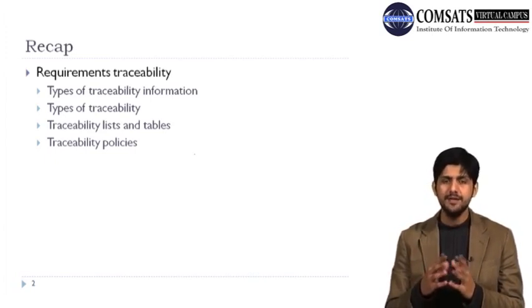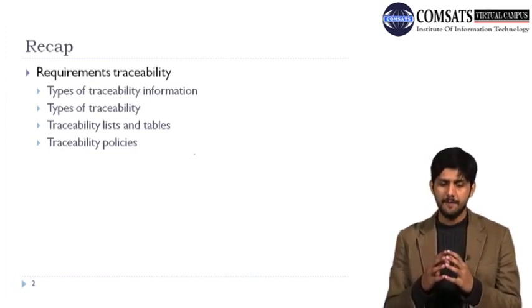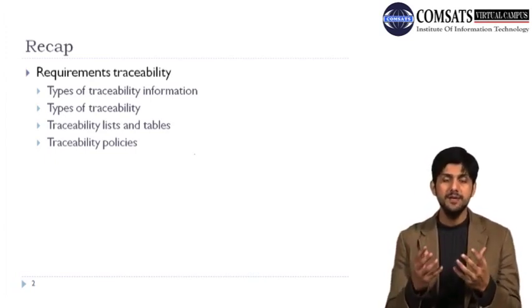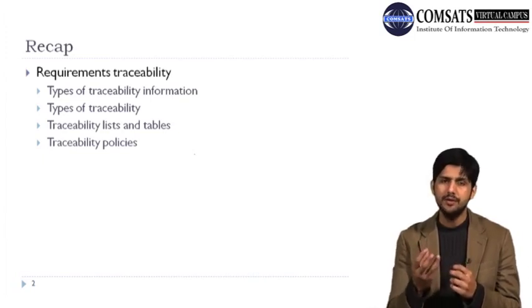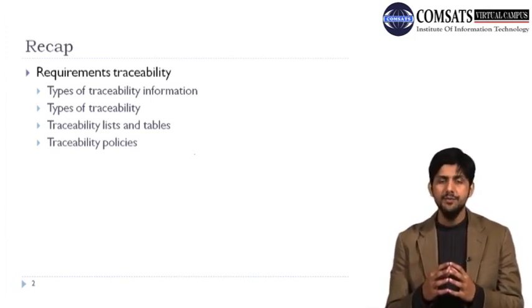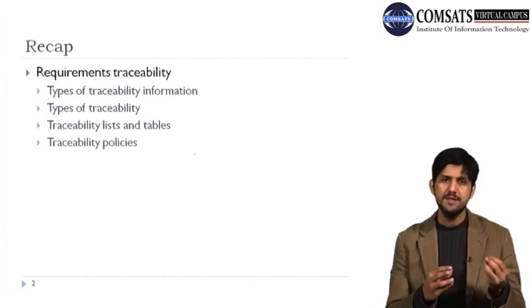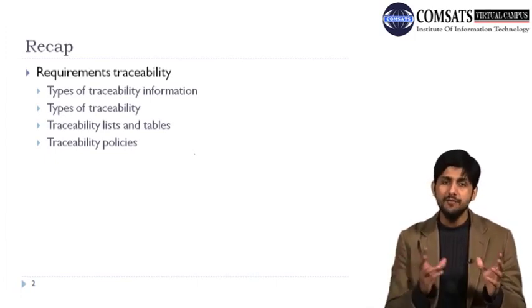So whenever there is a change in requirement or a change requested by a client in any form, we translate it into a set of requirements, and then we try to figure out that all these requirements are connected to each other. None of the requirements in the product would be standalone. It would have an impact on some of the other requirements. So we try to figure out that if one requirement is changed, which is the directly affected requirement, whether it will have any impact on the dependent requirements. So that is one form of traceability.